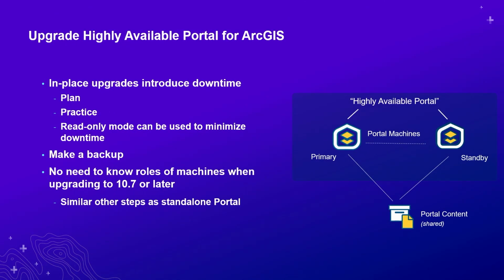When you're ready to upgrade the highly available portal, keep in mind that even though you have two machines, you still have a single portal, meaning there is going to be some downtime if you're going to do an in-place upgrade. So that being said, it's really important that you are planning for the upgrade, you're practicing the upgrade, and when possible, you take advantage of the read-only mode to minimize downtime once you are ready to upgrade from 10.8 to 10.8.1. I'll go into a bit more information about what read-only mode is later in this presentation.